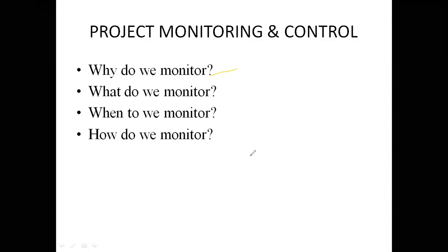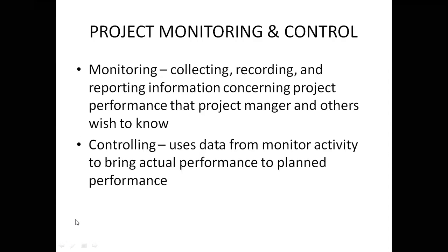See here, project monitoring and control. So evaluation and comparison of actual measured results against those planned is the fundamental process of the project monitoring process. Okay, whenever there is a variance, corrective action is required to keep the project on schedule and to budget.